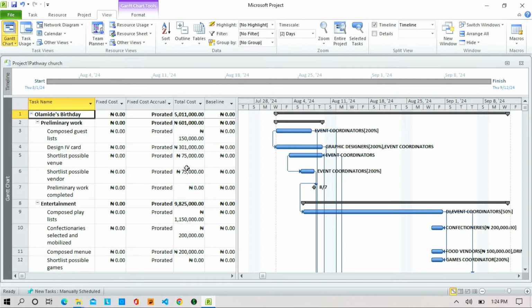That change request is not what you now use to effect that, particularly if that plan has been approved. So when they look at it, instead of using 4 inches, let's use 6 inches. To effect that change, you raise a change request. That change request at that stage is called preventive action.